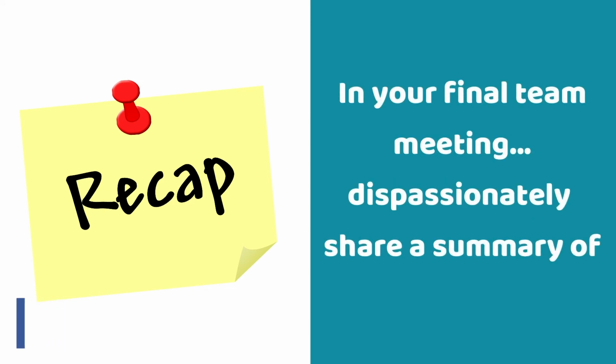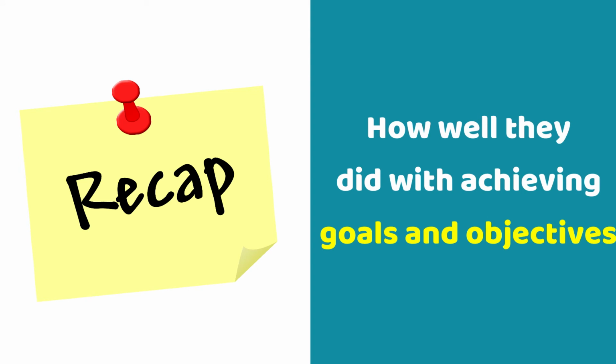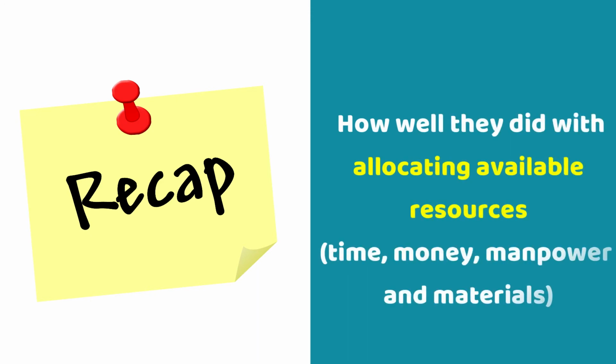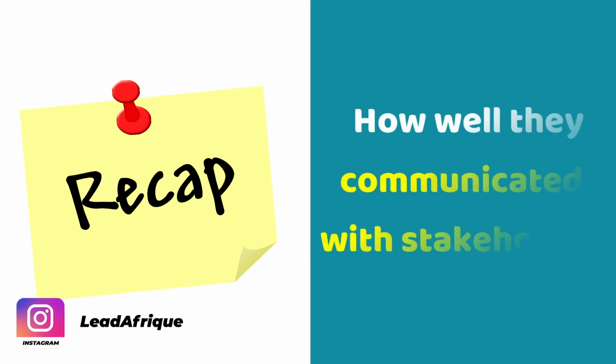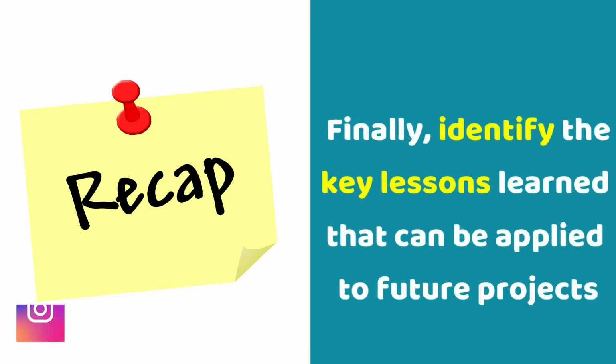In your final team meeting, dispassionately share a summary of how well the team did with the meeting deadlines, how well they did with achieving goals and objectives, how well they did with monitoring and staying within the budget, how well they did with allocating available resources, which are time, money, and the human resources, as well as materials. How well did they do with communicating with stakeholders? Finally, identify the key lessons learned that can be applied to future projects.